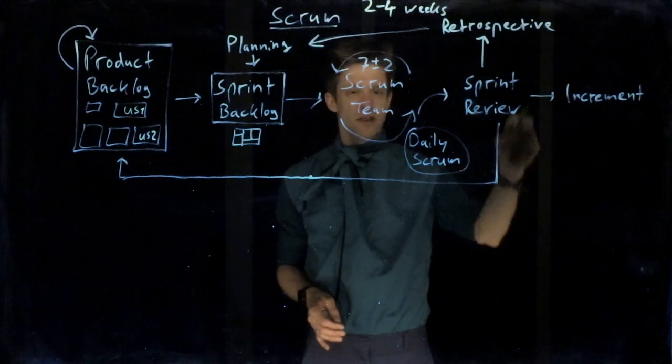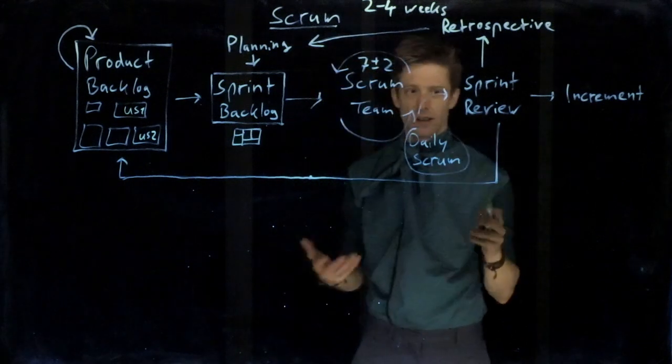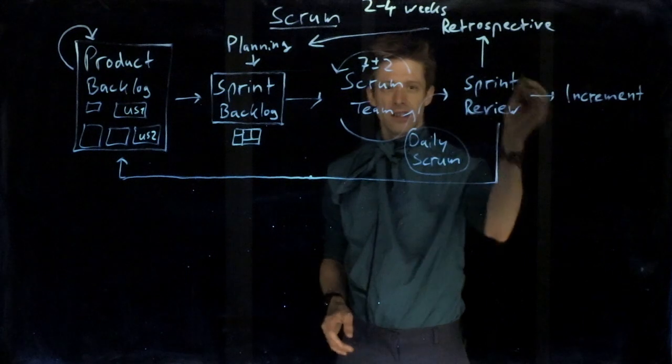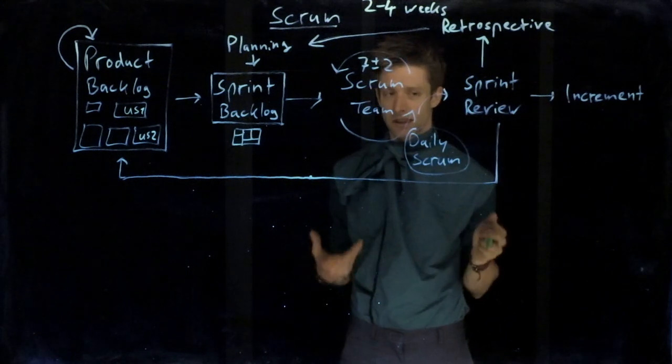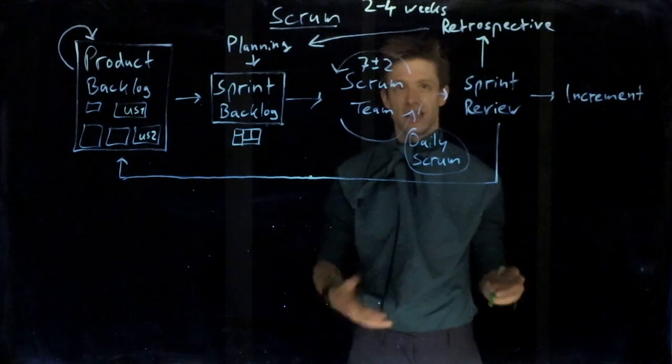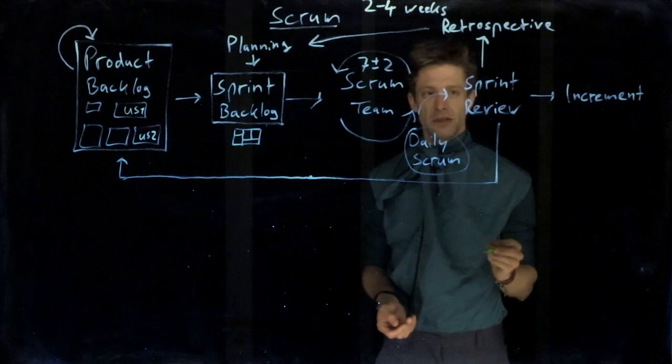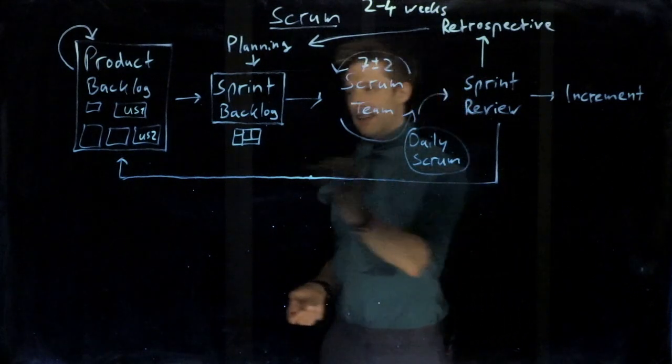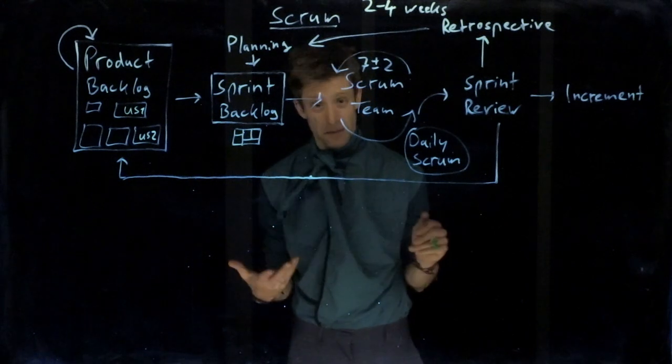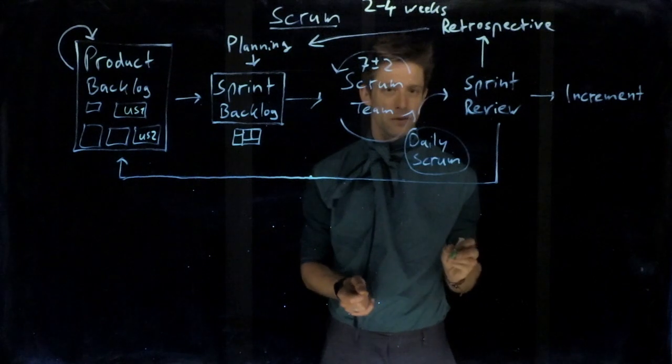Then you have the sprint review. Whenever you're done with the sprint, you have some increment, you have some deliverable, and that is being reviewed with the customer. You essentially demonstrate what you have produced in the sprint, and it should be something that gives functionality that can be run. Then that is being reviewed, and that usually can lead to new changes in the product backlog. You might realize that something was wrong before, or that you need something else that you didn't realize before. That's something you do in the sprint review.